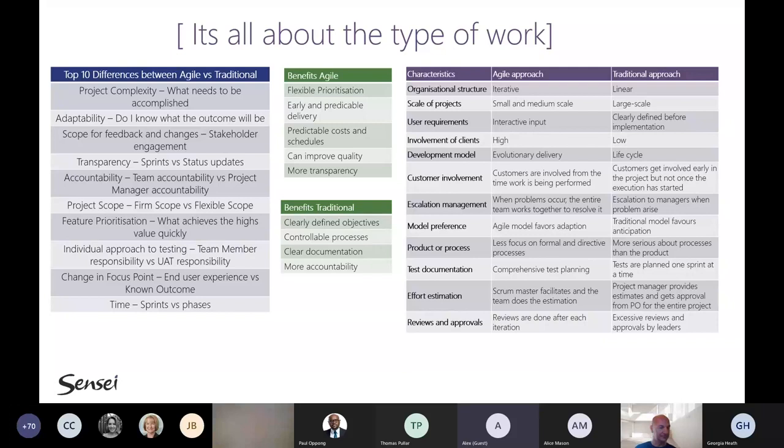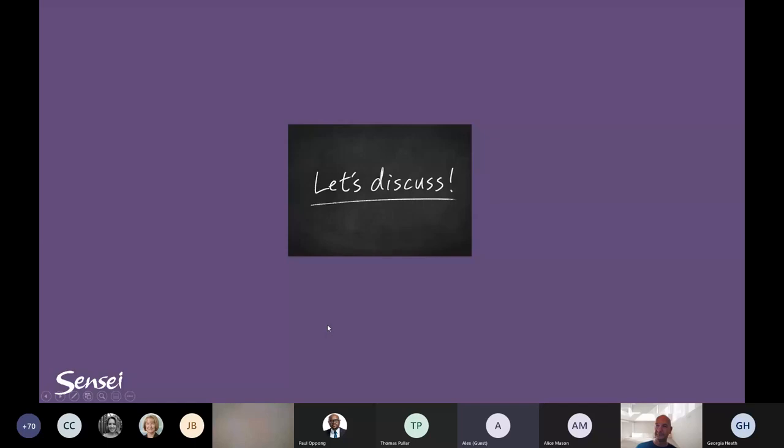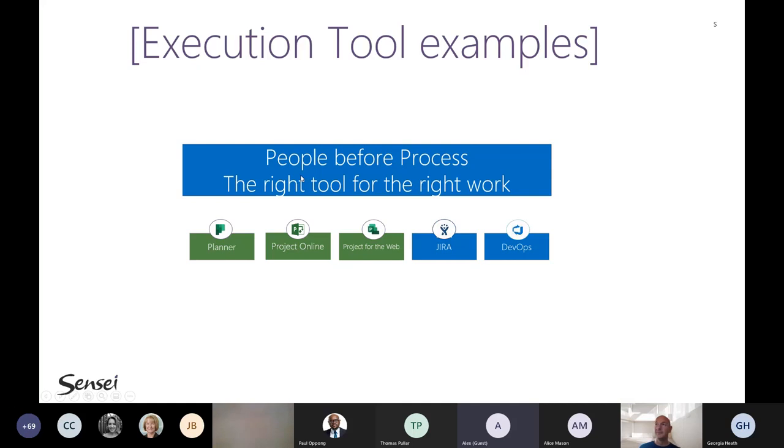So for clients who do need mature waterfall, we're using a tool called Spider Project. This is great for waterfall, and it allows building risk-integrated schedules with the cost, benefits, and other areas. It also allows using waterfall and Agile together, because Agile is very resource based. It's really about your resource optimization, your resource allocation to your sprints, to your activities. And tools like Jira are great for this from a prioritization perspective, but they do not take into account skills and other things.